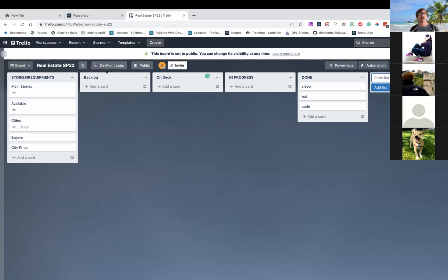Instead of hopping into the code, we can save ourselves a lot of headaches and troubles by planning this out a little bit. Once we come up with a little plan, we might have 20 tasks, and then I can guess better on how long those tasks are going to take.